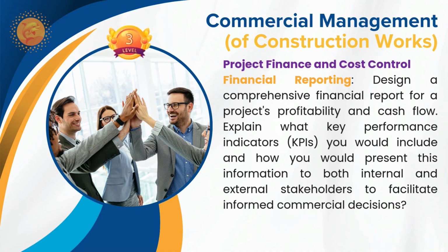How do you address the issues that may commonly occur within your construction phase? You may have something like productivity. You have to achieve the productivity from your workmanship, and control material wastage. Again, quality control and quality assurance: how do you follow the method statement which you submit before execution of work, and what happens during your material inspection and work inspection? Do you get any abortive reworks due to poor workmanship or material quality not up to the mark, or any supply chain inability to achieve the standard?